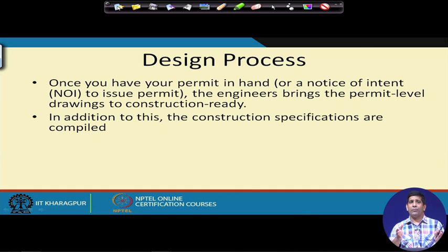To overcome those problems, I don't know what is happening today in the industry, and some of you who are connected with the industry right now should shed light on that. But that happened even for our MRPL project, and for some other projects at EIL during that time: they made a mobile design team. People like me who were still bachelors, not married at that time, were put on those mobile design teams, and we went to the sites and tried to solve design problems at the site itself, so that time is saved. That's because the client wants the work done as per schedule.